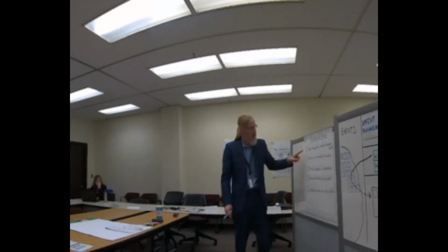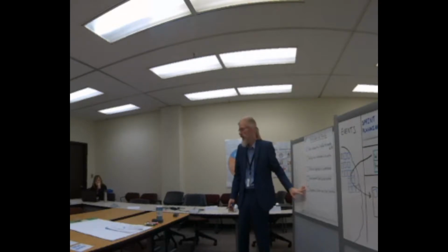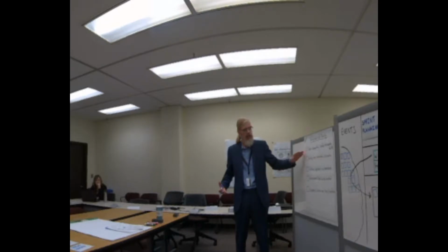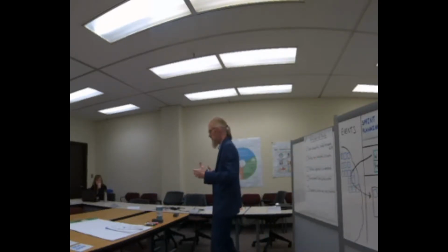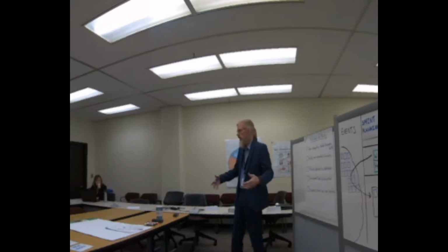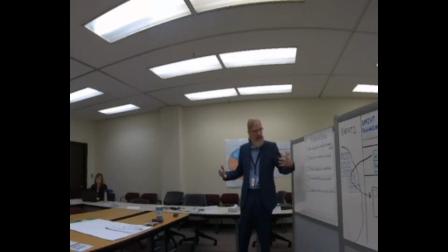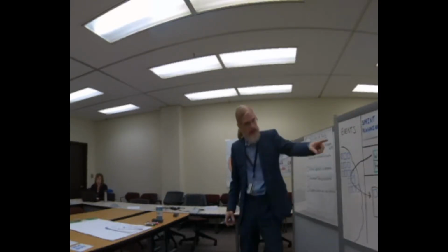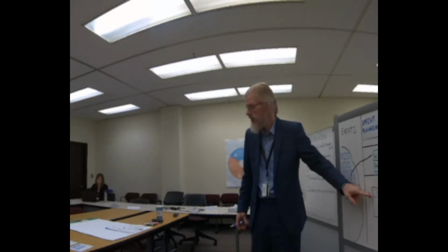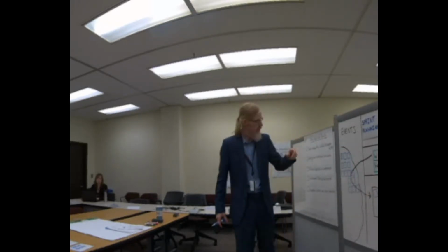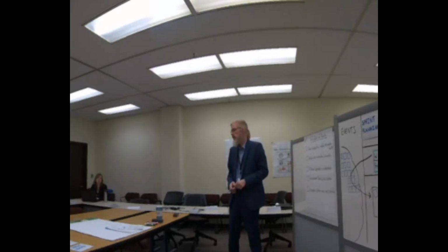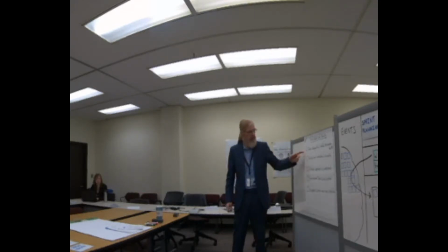We review these. So this is an example of a definition of ready, and I want to read through this because I think it's important to get an idea of what this looks like. But I do want to let you know that this will vary from team to team. This example is from software development. We know that we do this in infrastructure. It'll be a little bit different, but I want you to get the sense of this. The first one says, is the team adequately staffed to complete the product backlog item? So when this comes through in the what meeting, product owner says, I want to do this, the team will say, okay, first thing, are we adequately staffed? Is that a yes or a no? If it's a yes, then we'll move on.